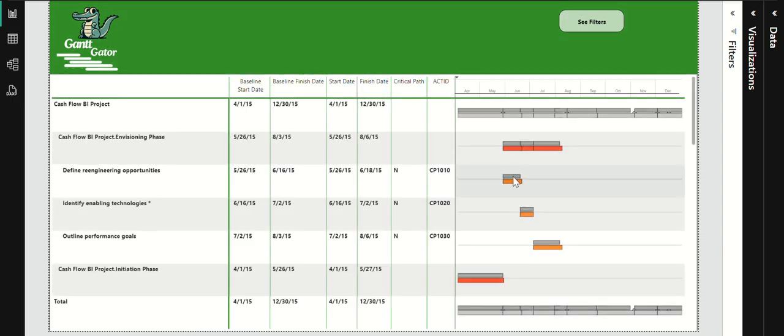Number 2 has a baseline, so you have your baseline above. The Primavera Gantt, I believe, has it below, but it's got a little creative there. Put it above. You can see this one goes beyond your baseline, so again, that might be a point of focus in a meeting with multiple stakeholders.